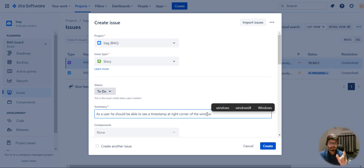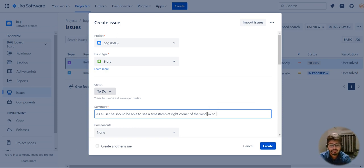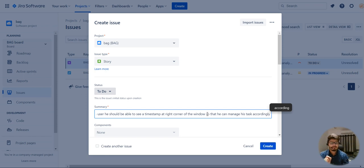Any user story starts with three things: as a user or as a person, he wants something, so that it should happen and be beneficial for him. So the user story is: 'As a user, he should be able to see a timestamp at the right corner of the window so that he can manage his task accordingly.' This is the basic and very simple user story format.